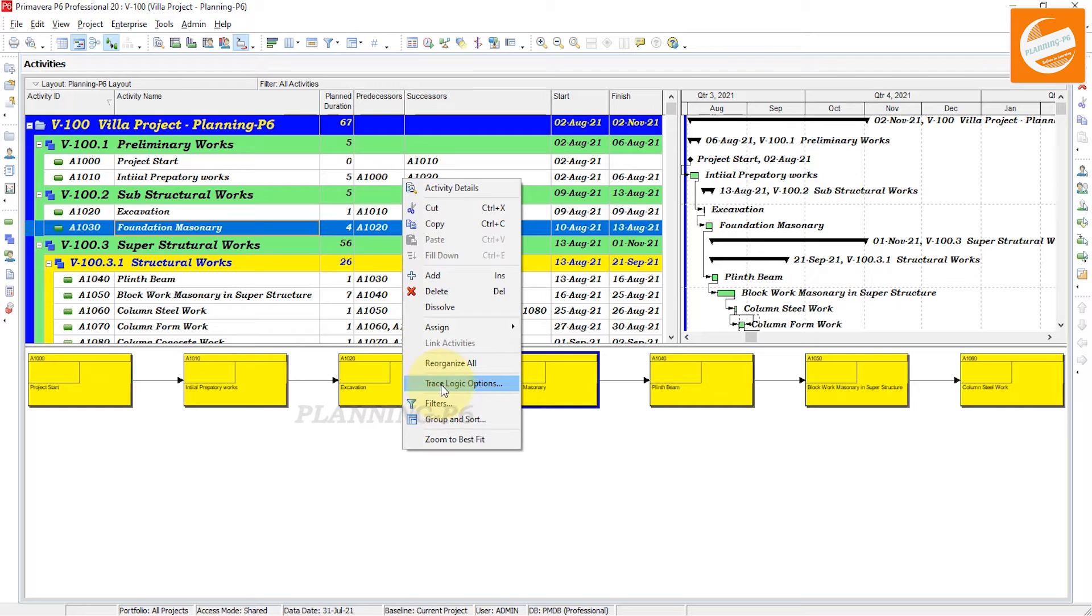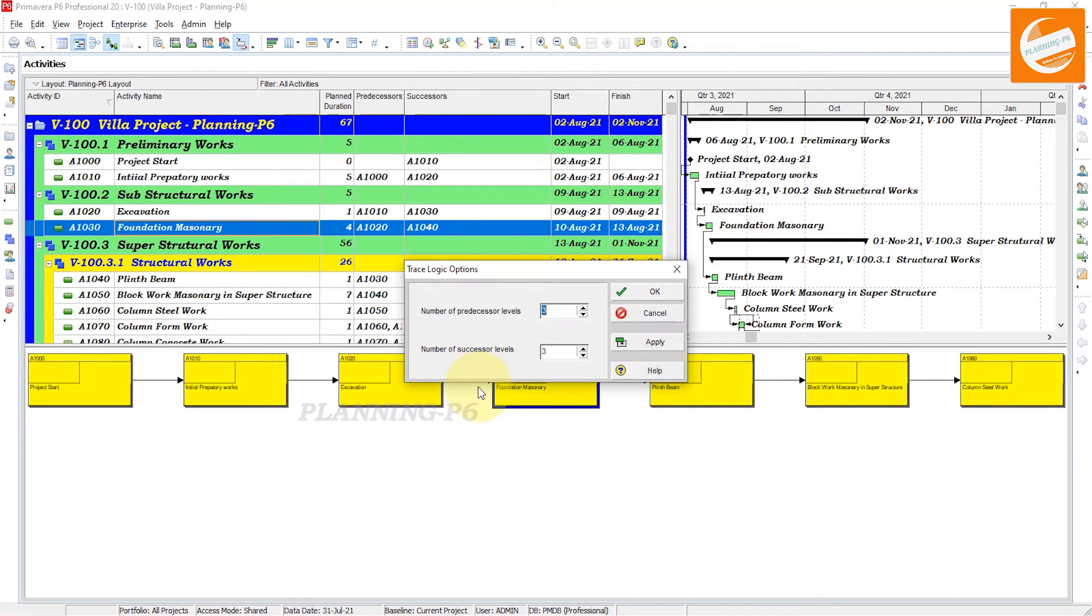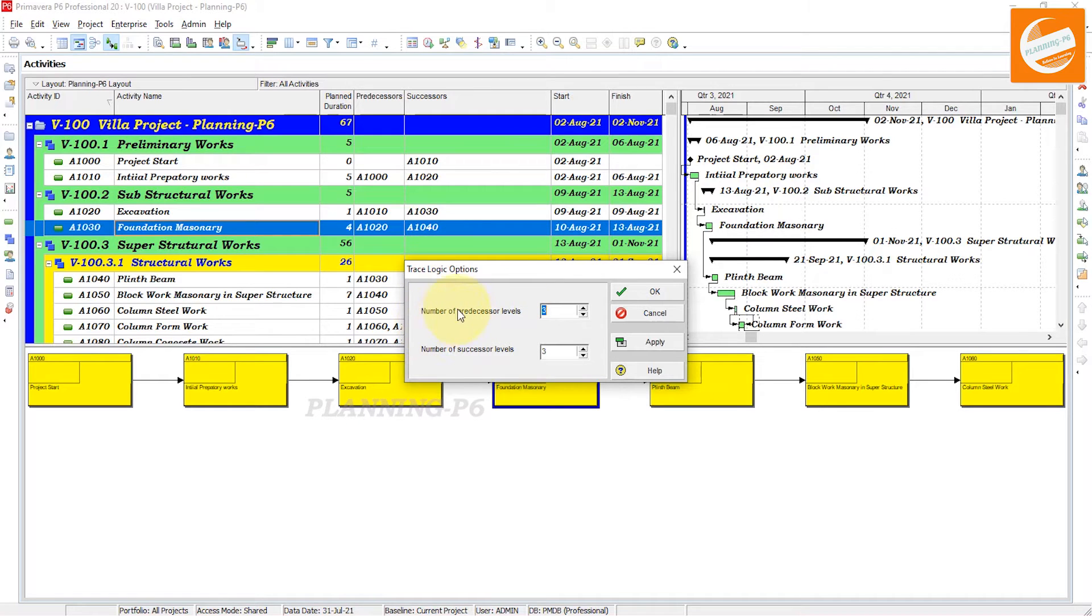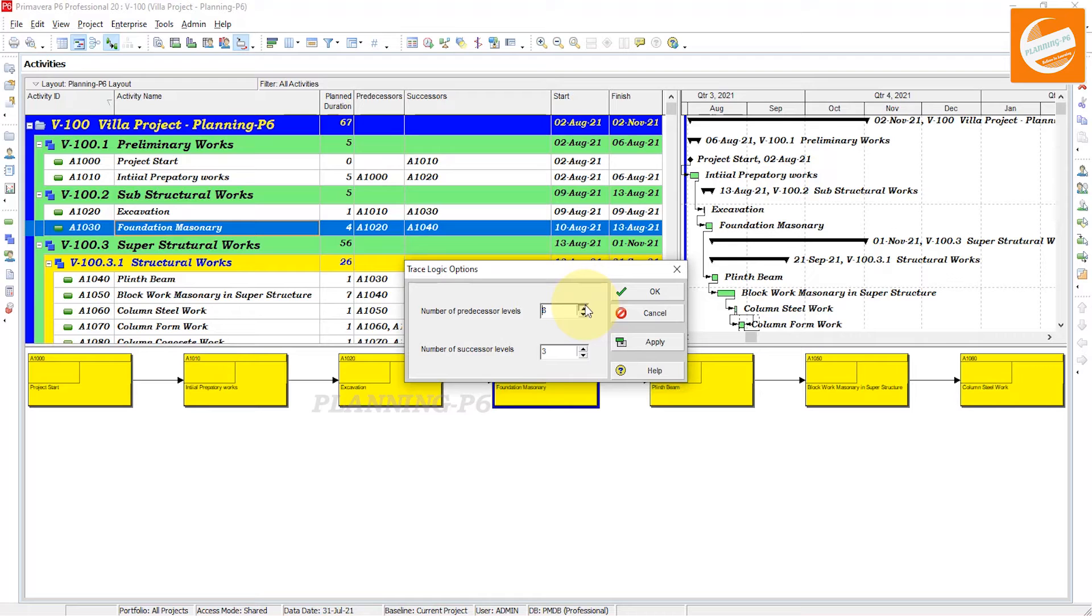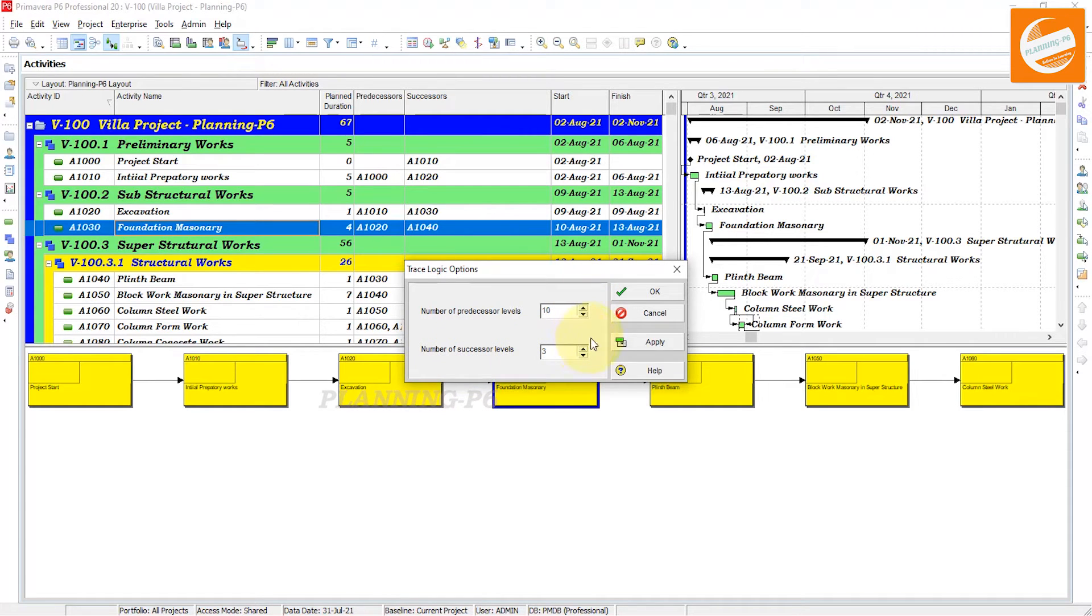Go to the trace logic option here. You can see number of predecessor levels - let's say up to 10 - and then number of successor levels up to 10. Apply, OK.